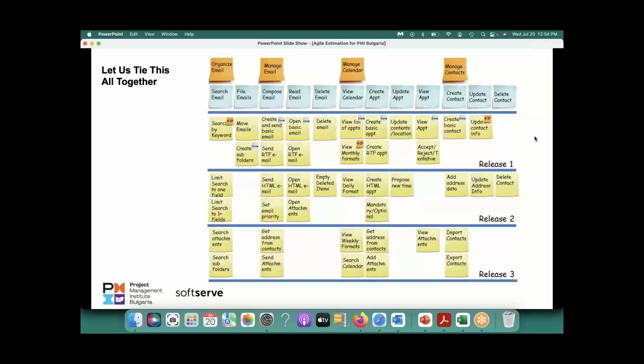Now you do this planning, and you prioritize. Let's say there are a total of 50 items here. You prioritize the 50 items, and you start working in your releases. Smaller releases are better. You start giving it to the users, and they start using it. Now, invariably, changes will happen. A change comes, you evaluate it, and with the help of the product owner, prioritize the new change. Let's say you already finished 10 stories, the remaining are 40, and then this comes. Maybe it goes on top of the backlog, somewhere in between, or at the bottom, wherever. You put that, and you keep delivering.